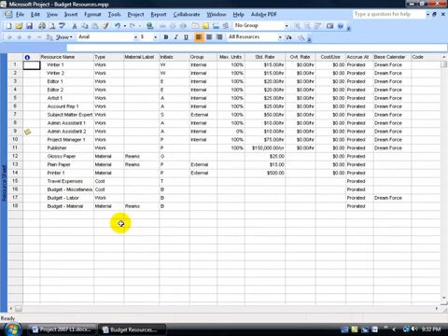So the next question is, where do I enter in all my values for my budget resources? And the operative word is values. Again, the value for the cost resource is going to be in currency. For work, it's going to be in hours, and for materials, it's going to be in units. Well, remember, this is a resource, and we're going to assign these resources, just like we did all the others, the work, the materials, to a task.